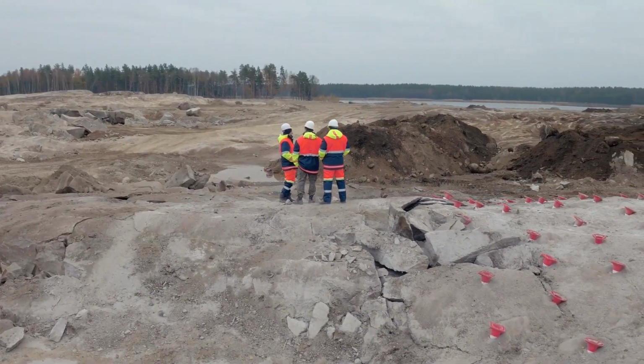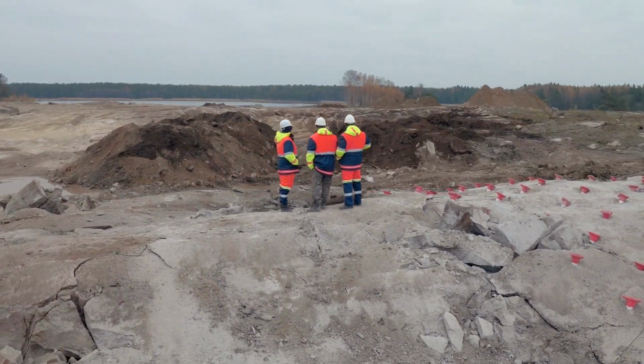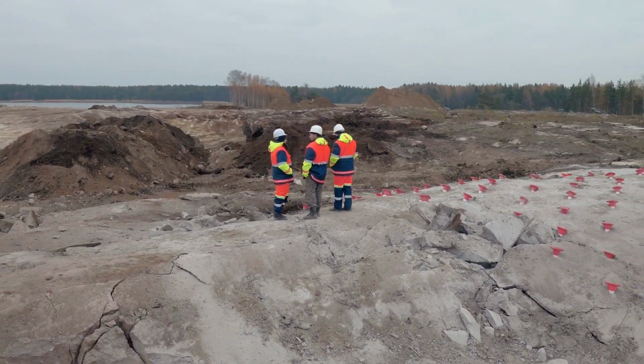The transition from design to construction is pretty straightforward. The design team needs to have each design package available to the construction team with enough advance notice for them to be able to properly plan for the work. Since construction and commissioning are both on-site activities, the transition becomes much more complex due to the logistics of two groups working in close proximity. This presents many technical and safety challenges that need to be planned for well in advance for each mechanical completion.